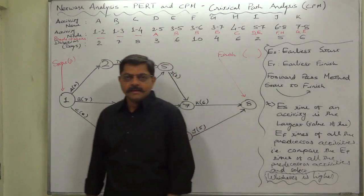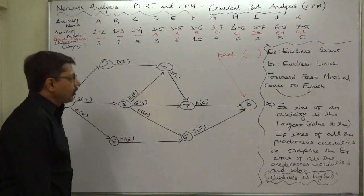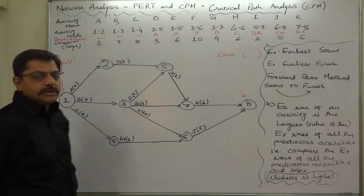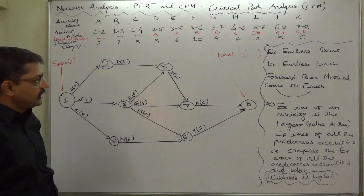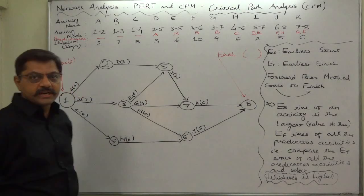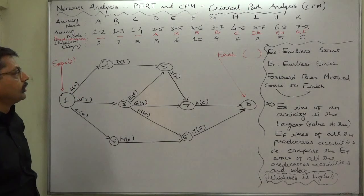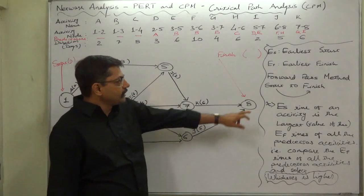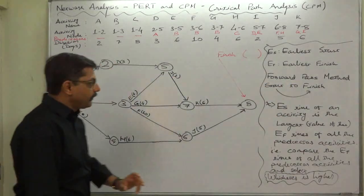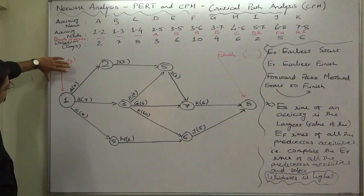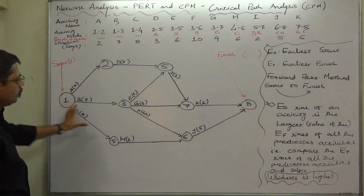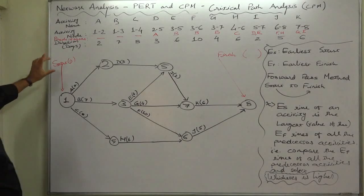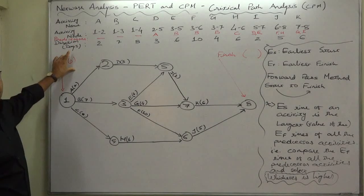Hello, namaskar and welcome. In the previous lecture we have already drawn a network or pod chart for this data. Now we are going to start a new topic: earliest start and earliest finish of each and every activity. To determine the earliest start time and earliest finish time of the activities, we are going to follow the forward pass method. Forward pass method means our journey will be from start to finish of the project, from left to right.